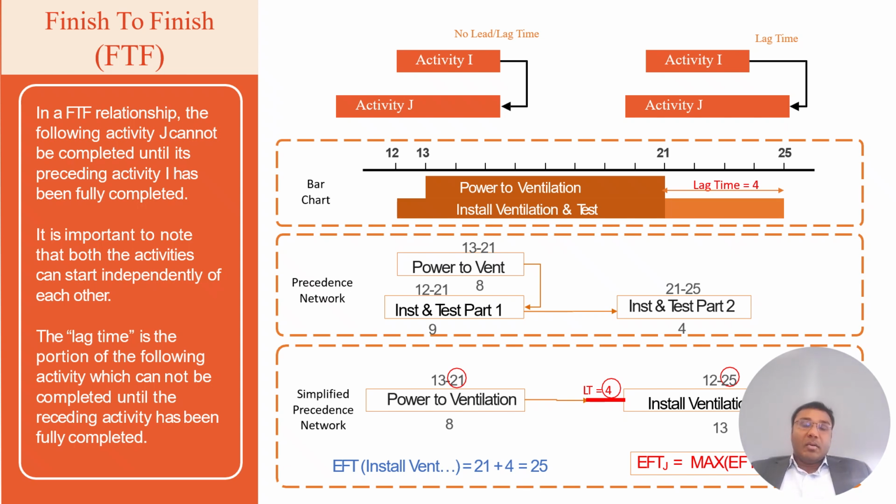One example we can look at is installing and testing ventilation, which can start early but must finish 4 days after power is supplied. So in this case, the early finish time of install and test equals the early finish time of power and ventilation plus 4 days, which is your 25 days.